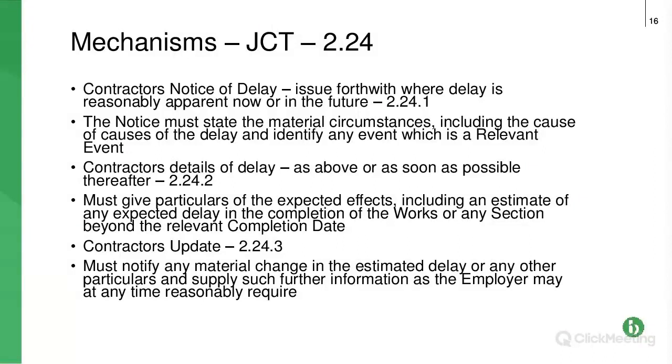So think of this high level. As soon as you know you've got a delay, you need to be thinking about notifying. Forget about which contract you're on for 2 seconds. Just think, right, we need to be thinking about notifying. And then start to look at the notice provisions, because you can pretty much guarantee in all construction contracts you are going to need to notify. If you notify and you don't need to, no one's going to penalise you, but you will definitely be penalised if you don't notify, and that means if you don't notify within the timescales, or if you don't